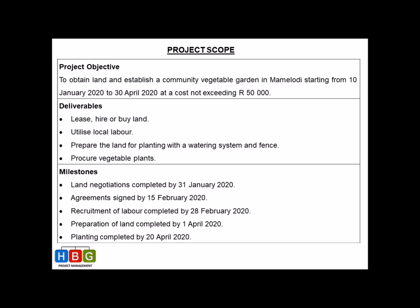Now we move on to the project deliverables. Deliverables are basically the elements that must be delivered by the project to make sure that the project objective is attained at the end of the day. The deliverables for this project are: lease, hire, or buy the land; utilize local labor; prepare the land for planting with a watering system and a fence; and procure vegetable plants. I derived these by breaking the main project objective into manageable pieces — covering land, labor, preparation, and procurement — which you will later plan in much more detail.